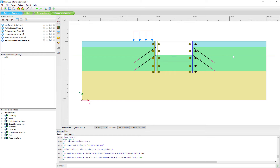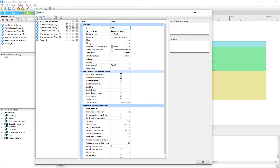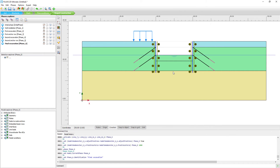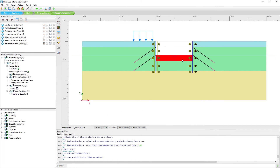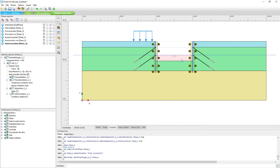Everything is nicely activated. We can see that the groundwater table is now at the excavation bottom. The next phase is the final excavation step — phase six, called 'final excavation.' We click OK and deactivate the bottom soil region. To achieve a dry excavation, we need to ensure pore pressures are properly updated, not simply set the region to dry.